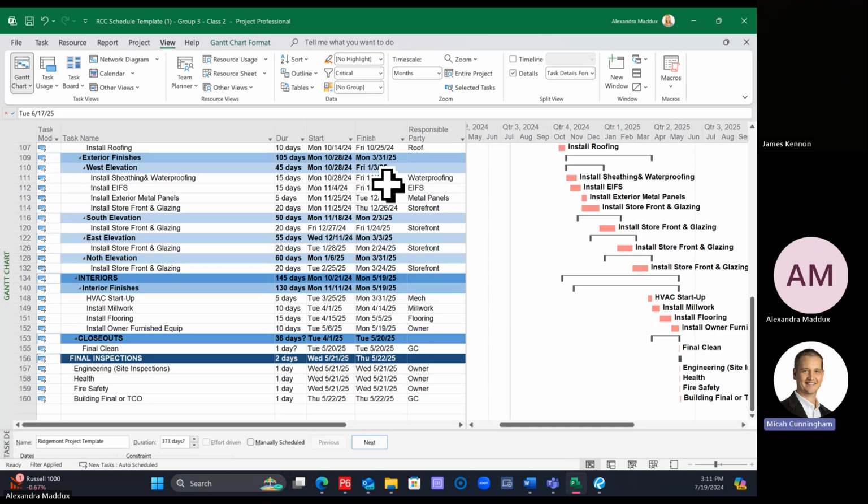I find that typically you would know what's critical before a schedule would tell you. You would know what's critical in the field. So if it makes sense for what you think it should be, then you're good to go. This would be just the last step, going through and saying, did I miss something? Does this look right? And validating from your own knowledge if your critical path is correct.